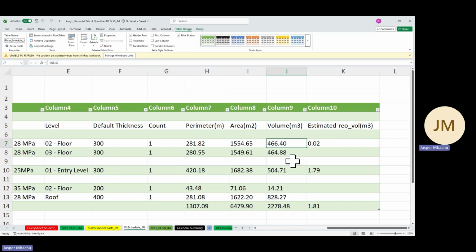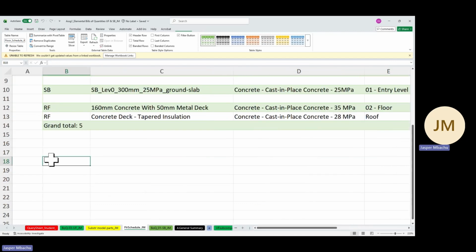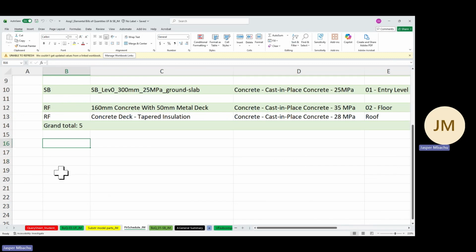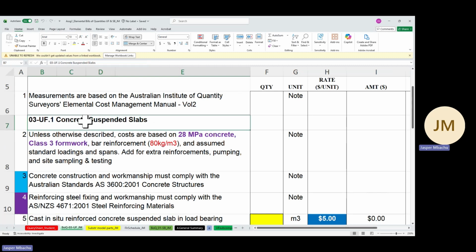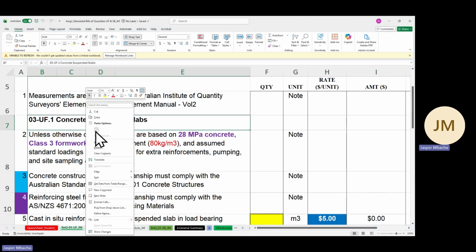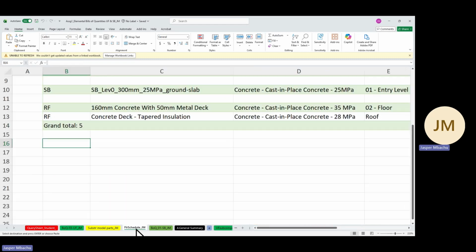Okay, so what we need to do within this worksheet is our side casting, so to say, the waste calculation that you guys used to know about. This is still measurement, only that it is digital. So let's go to the bill of quantities for upper floor, click on it, and look at the subheading for these suspended floors. Click here and select it. Right click and copy that. We want to copy this information and then go back to that floor schedule, somewhere here, Control V, paste it.